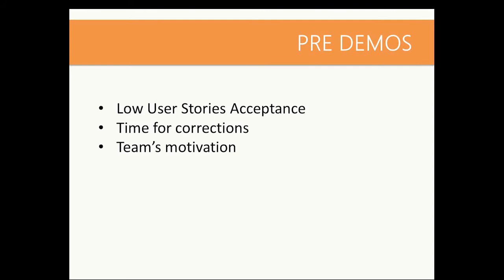The thing is that when we got to the demos, mainly on the first sprints where we were getting to know each other and getting familiar with the application, a lot of user stories were rejected by the POs. That generated a lot of carryover from one sprint to another, and also an impact on the team's morale, because it was a huge amount of work that was rejected and needed to be redone.